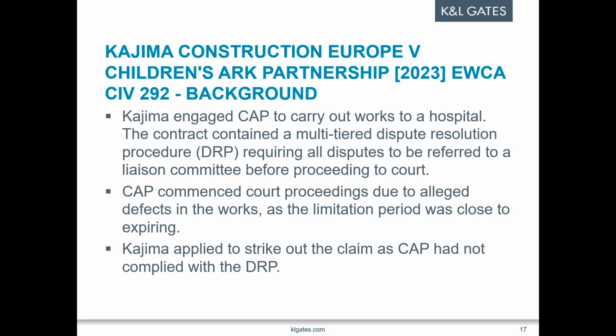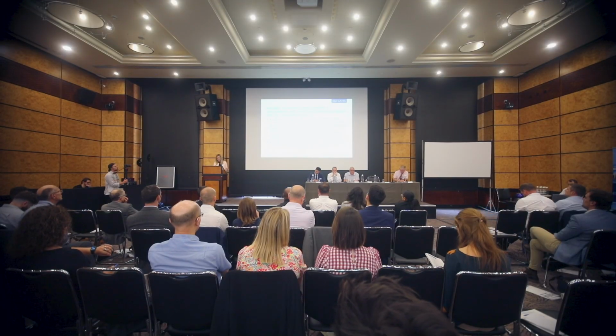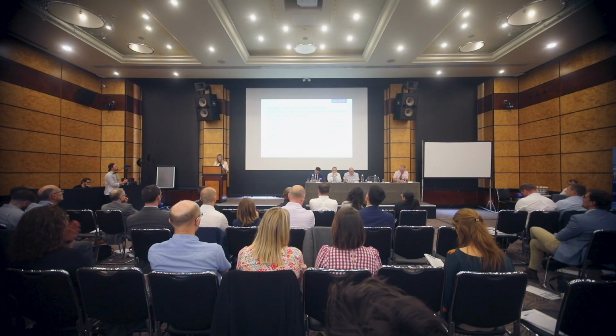And in this case, Kojima had entered into a contract with the Children's Art Partnership to design and build actually the redevelopment of the Royal Alexandra Hospital for Sick Children in Brighton. It was a PFI project, and CAP had a project agreement with the NHS Trust. There was a dispute resolution procedure in the construction contract which required disputes to be referred to a liaison committee prior to instigating court proceedings.